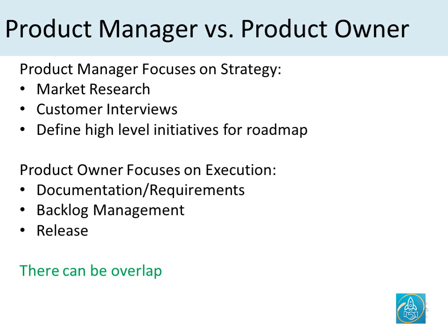And then it is the job of the product owner to document all the requirements in the form of user stories, getting the acceptance criteria, which would be business rules, all that kind of stuff, and getting the design documents, which could be mock-ups, anything that supplements the user stories, and whatever is required by the development team to do the actual execution.